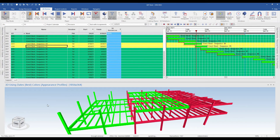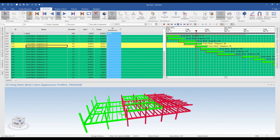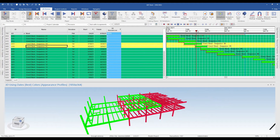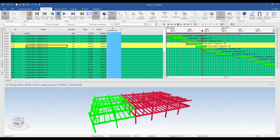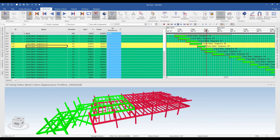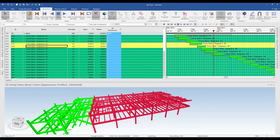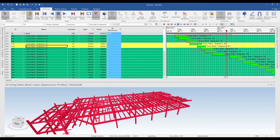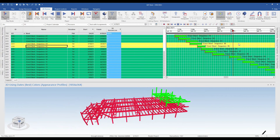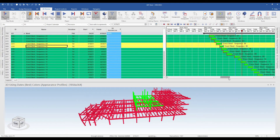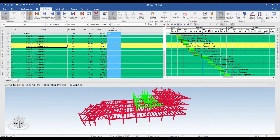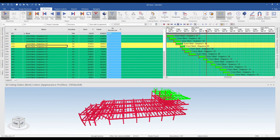If I escape, you can see these two activities are showing as green, which means they are getting installed at this particular time. Going ahead, again we have two sequences getting activated at any particular time. This means we have two teams of steel erectors that will always be available on site, doing the steel installation work.